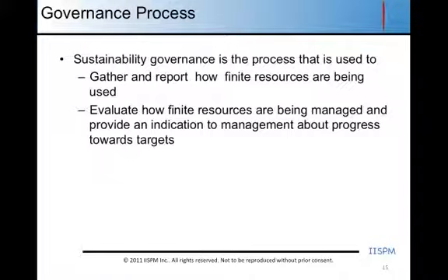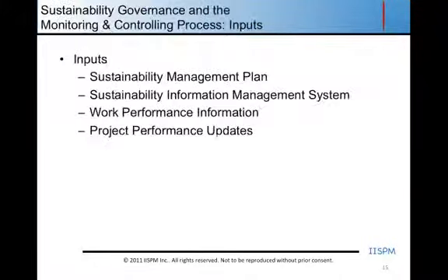Where that might change, of course, is as you get closer to the end of the project and we're starting to tie things up and we're starting to understand where all of our costs may be, where all the resource usage might be, you might actually tighten up your governance reporting and start reporting governance every couple of weeks. Or alternatively, if your project has gone somewhat off track, you may tighten up governance reporting to have a better focus on it from all management levels for a period of time. So you might go from monthly down to bi-weekly, or in extreme cases you might even be reporting governance on a weekly basis. So as I said, this is a monitoring and controlling process within projects.